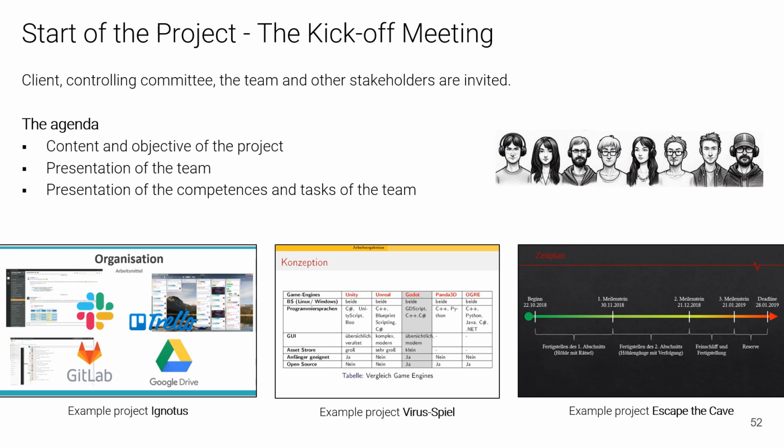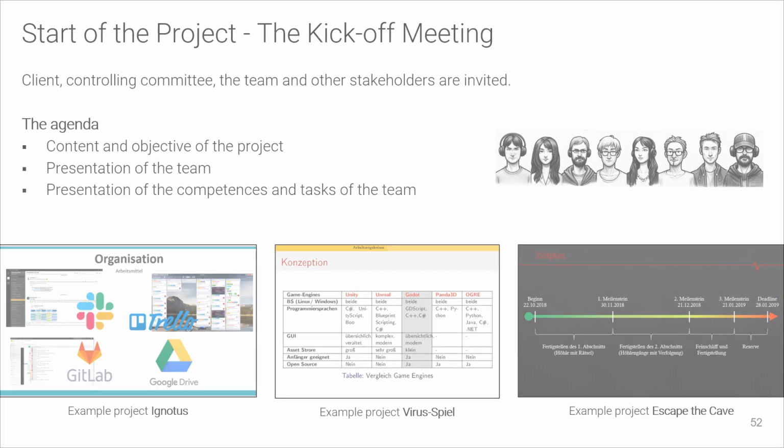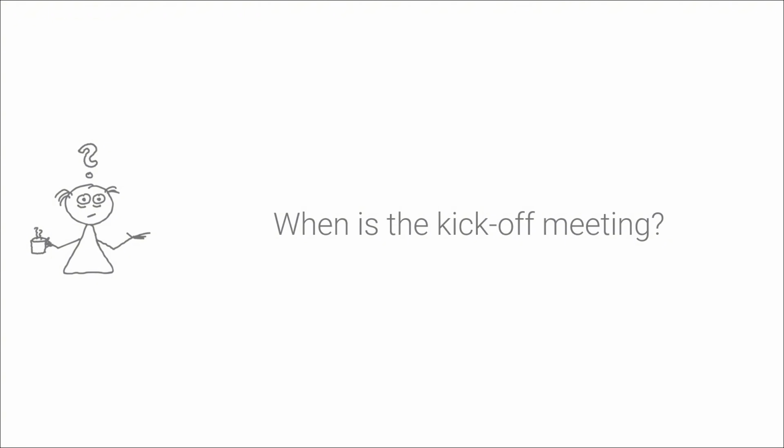I think it is very important that we start this with a kickoff meeting. If it can be arranged, the client, all team members and other stakeholders are invited. The project manager then introduces the content, goals, team members, and their roles in the project. Below you can see three examples of a kickoff meeting here in another lecture called 3D Programming. Question for you, when is the kickoff meeting?